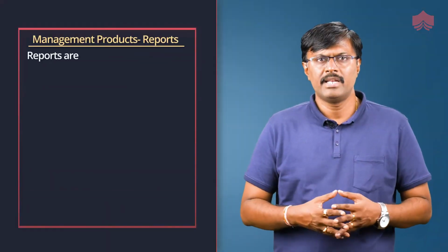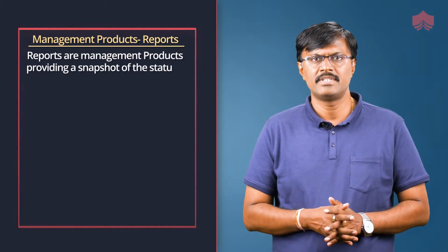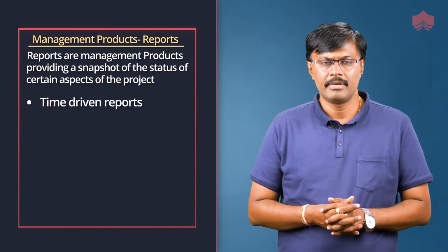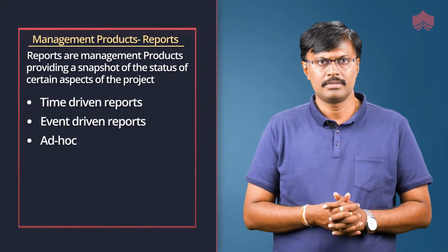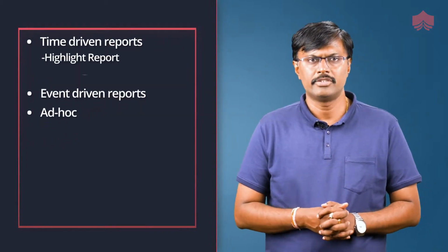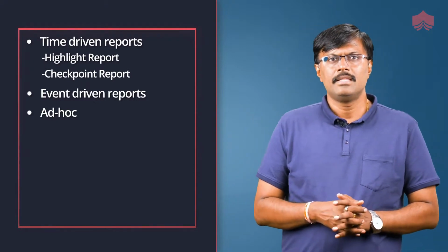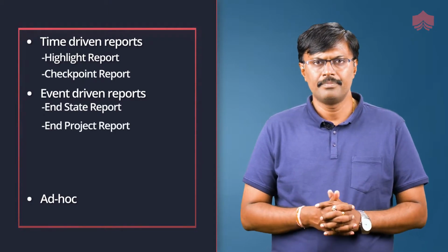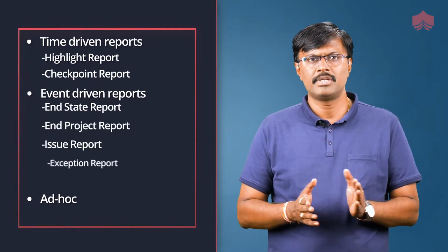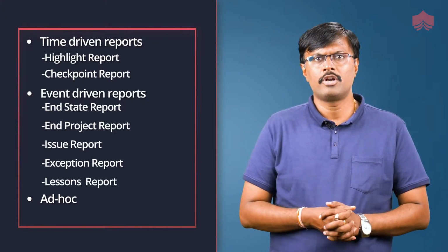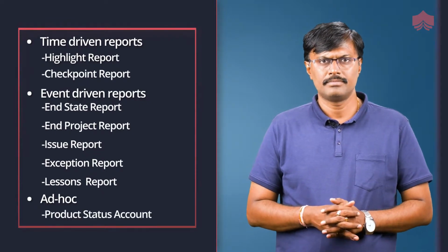Management products, reports. Reports are management products providing a snapshot of the status of certain aspects of the project. Reports can be time-driven, event-driven or ad hoc. The time-driven reports are the highlight report and checkpoint report. The event-driven reports are the end stage report, end project report, issue report, exception report and lessons report. The report which is produced on an ad hoc basis is the product status account.